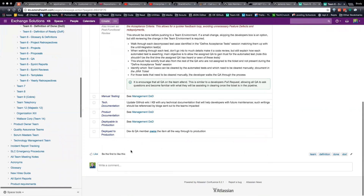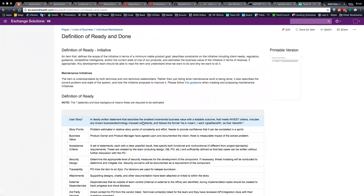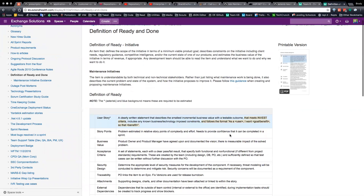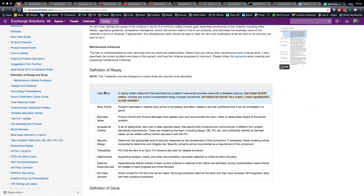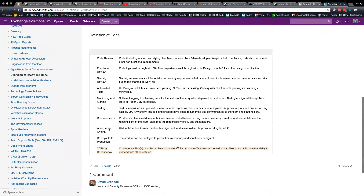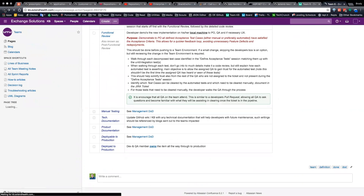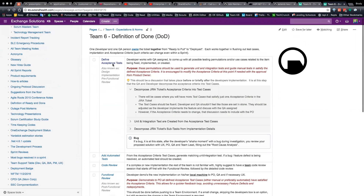Where's the actual company's definition of done? I linked the wrong thing. Here's the company's definition of done. Their functional review was after the code was done — they didn't have anything before. So I went with calling it a functional review for after the fact, and then I created the new name called 'define acceptance tests' as the first thing that we do.